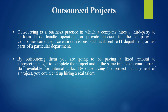While developing a large project, it sometimes makes good commercial sense for a company to outsource some parts of its work to other companies. For example, a company may consider outsourcing if it does not have sufficient expertise to develop some specific part of the project, or if it determines that some part can be developed more cost-effectively by another company. Since an outsourced project is a small part of a larger project, it is usually small in size and needs to be completed within a few months. Managing an outsourced project entails special challenges.